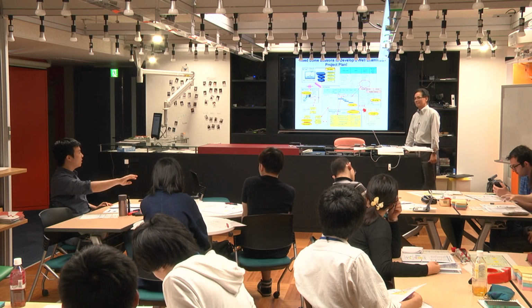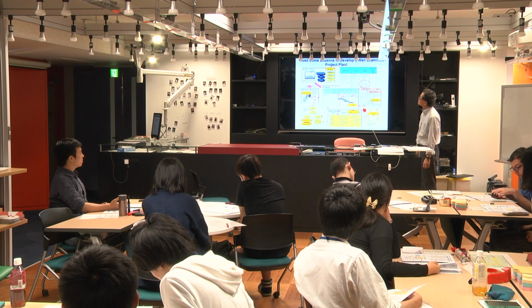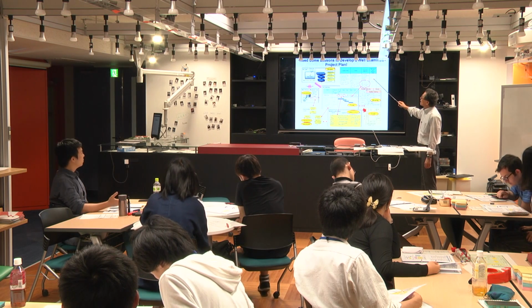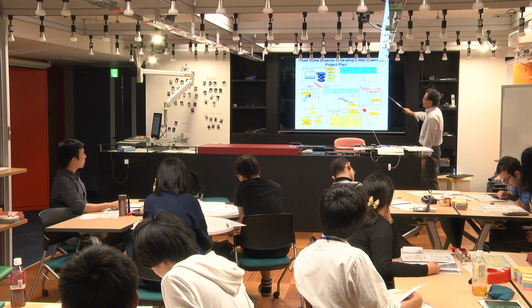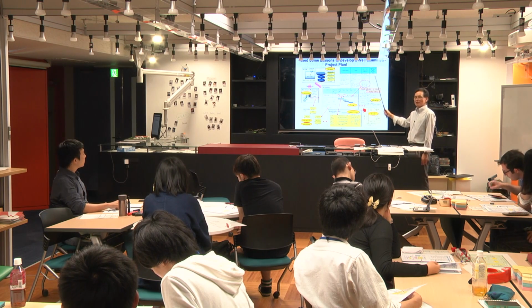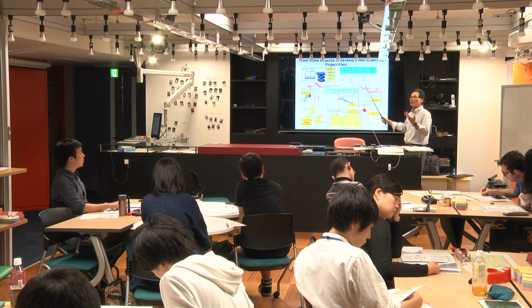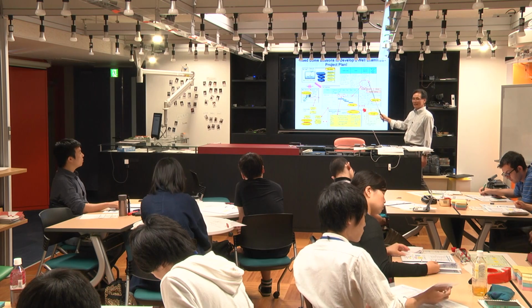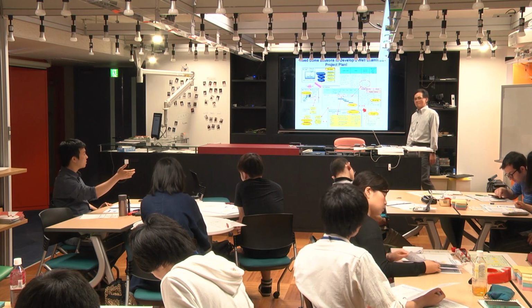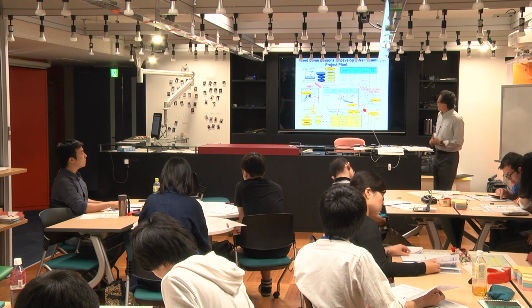Yes. We cannot see it before we start. So should we do it continuously? So that's why you need to regularly maintain this risk assessment sheet. For example, every month, not every week, not every day. I see. So you mean during the project until the project ends? Yes. I think you can.